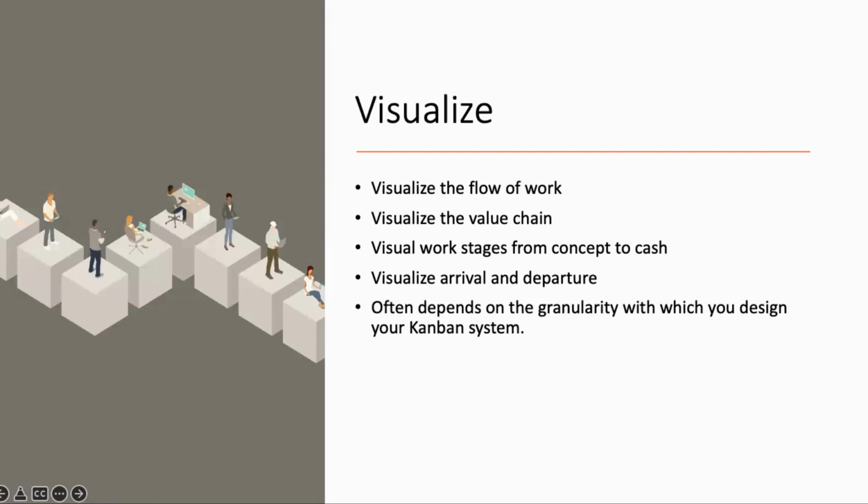So you look at the cycle times, you try to plot them. You might find that there are certain patterns that you can observe in your cycle time. You might come across a pattern like 5 items are finishing with a cycle time of 8 days, whereas there are a few outliers on the side which are finishing quite late, or some of the work is finishing early.